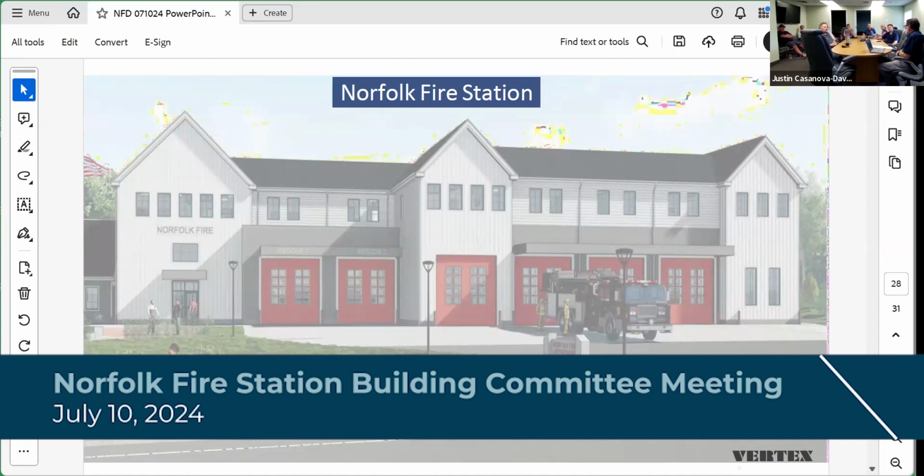But again, I think it's pretty well known that the HVAC equipment has to take the priority because the HVAC sub then has to do a whole bunch of stuff once they do startup. And it's not a couple days. Testing and balancing in that building is probably a couple weeks. And we're going to need that testing and balancing report for the building inspection.